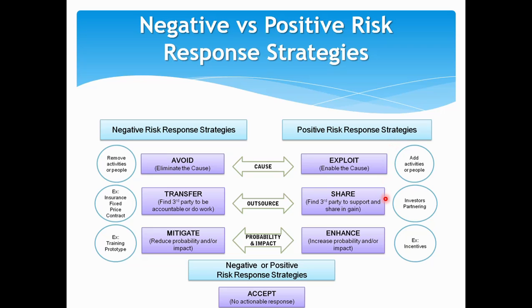If it is a low probability of happening but a high impact, then it's a long term shot. You will have to invest certain money, because it's not going to give you a near term return because of the low probability of happening, but you will have to nurture it and bring it to a state where it starts giving you an opportunity.